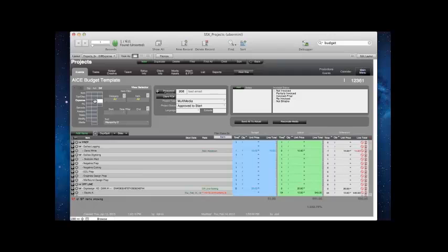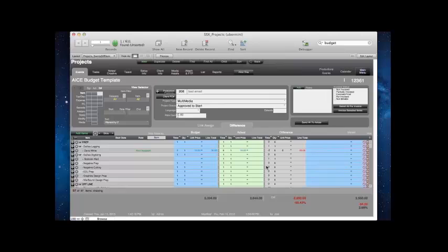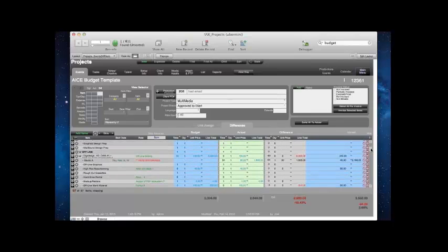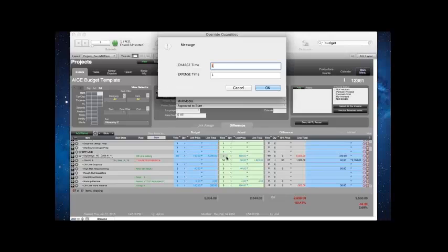And there's also something called market rate that I'll mention. So if I go over to my difference view, when I pull this out, here's our budget, here's our actual, here's the difference. Within each rate, you can specify what a market rate would be. And so I don't have a lot of data filled in there, but we can see that for this DigiDesign, we budgeted $100. The actual was also $100, but we didn't do any of it. And then the market rate is $340. So our quote is much lower.